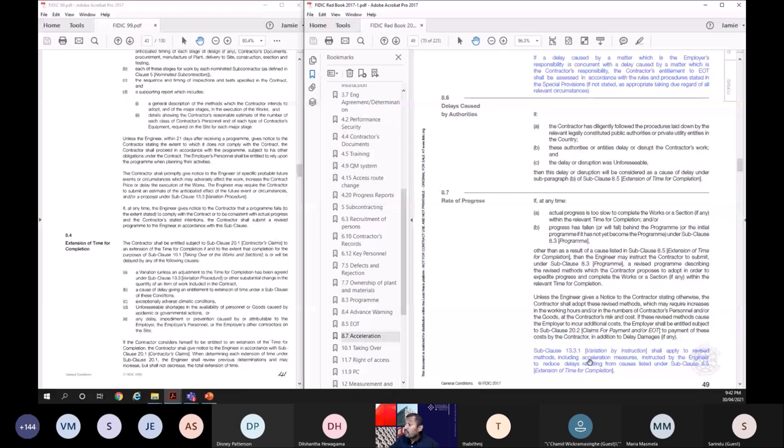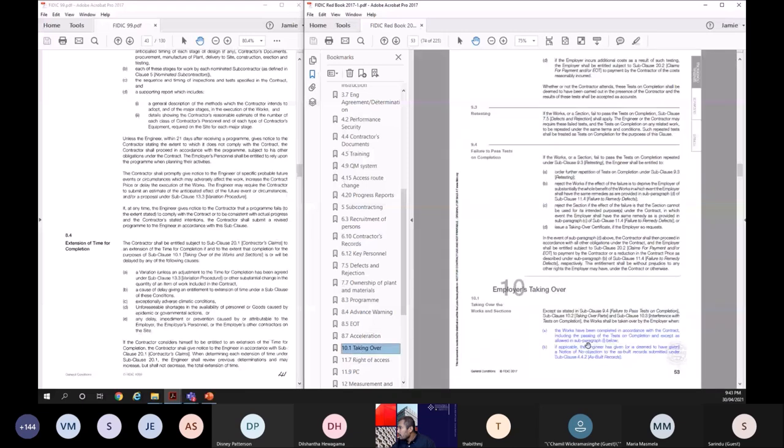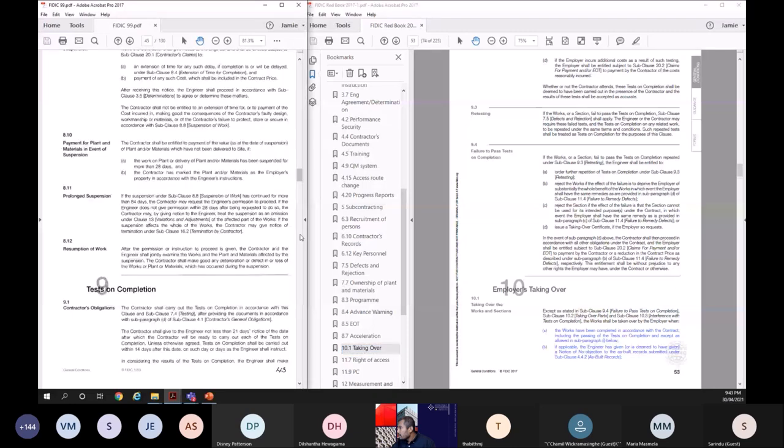Right, with that, I'll go to the taking over. What are the differences in the taking over? So I'm going through the basic or the significant changes, including the passing test. You remember that we discussed the requirements for a project to be taken over. The main requirements are the works should be completed, tests on completion should be passed, and the as-built records should have been approved,